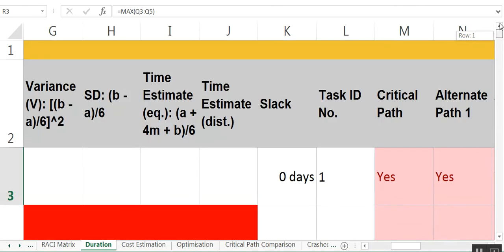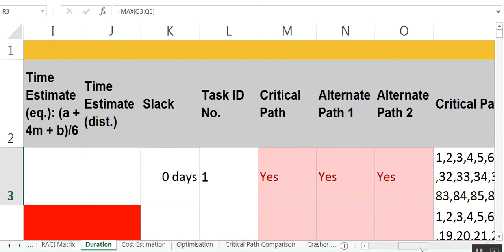Again, looking at the top, critical path, alternate critical path. Alternate critical paths are somewhat confusing, but basically a good way to think about them is that we've looked at the amount of slack, and if our pessimistic time estimate was to come into play, whether there would be any slack available. In other words, it's very similar to looking at 3 times the variance, so it's pretty much the same sort of logic. So we just want you to be able to demonstrate that.